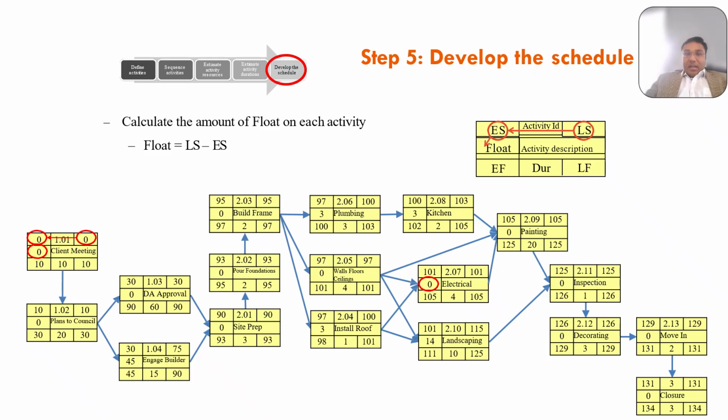It looks like late finish minus early finish equals your total float. Alternately, you can subtract the task's early start date from its late start date, and that gives you the float. Both of these formulas will give you the task float.